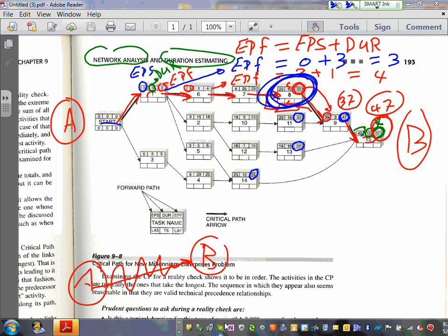Derek, because you were the obstacle at 20 weeks, I'm going to go hire or assign another individual on this project and split the activities by half. Now there's a dollar value assigned to that individual. So you have to pump money and resources in order to relieve that path. That will guarantee you reach the destination. So these are the activities that they use to relieve the project, my friends.